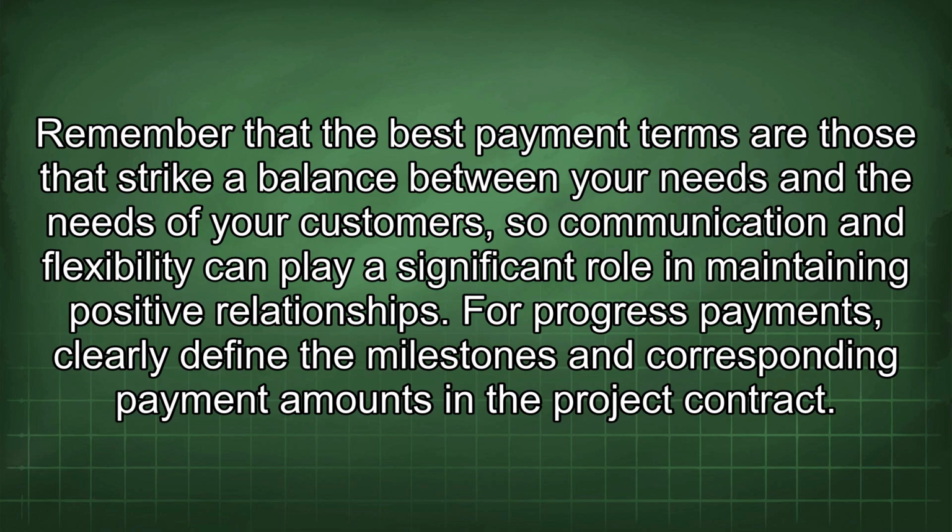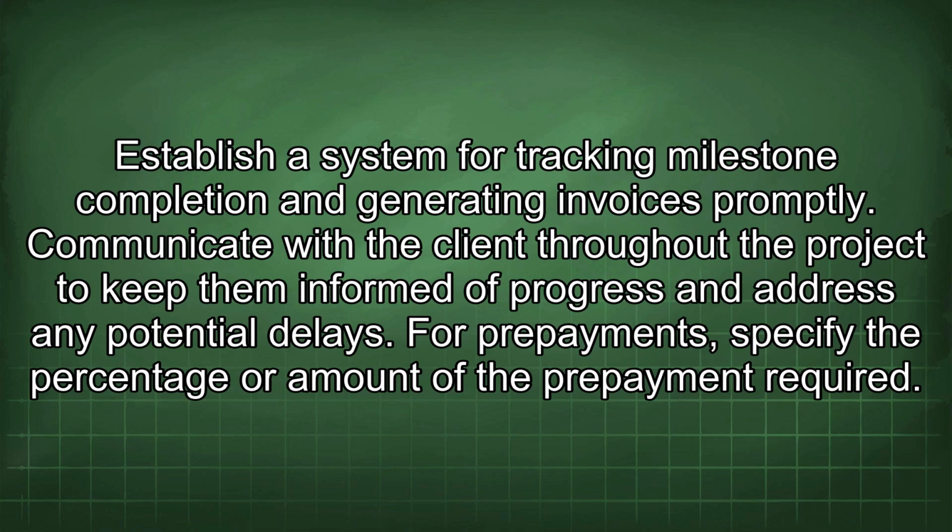For progress payments, clearly define the milestones and corresponding payment amounts in the project contract. Establish a system for tracking milestone completion and generating invoices promptly. Communicate with the client throughout the project to keep them informed of progress and address any potential delays.